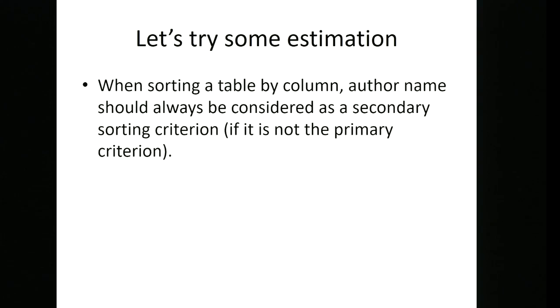So thinking away from this particular problem, it is very common for a developer to have in mind that they are going to complete something quickly, because writing the basic functionality is quite straightforward, but then all of the stuff around quality assurance and getting it in front of the user and everything else just isn't factored into that time. So this is one of the common problems in software projects. Okay, but fortunately we're doing an agile project. So